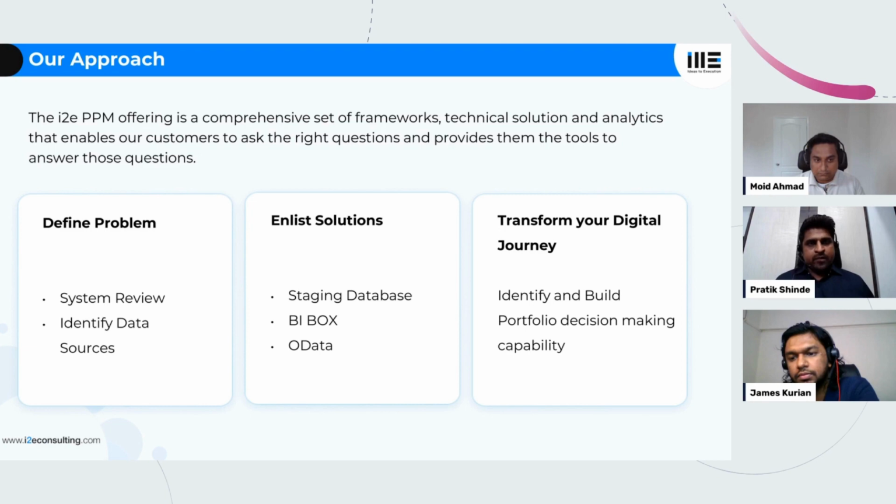We also look into the pain points of the customer, what expectations they have when it comes to reporting, what key KPIs they look for when they want to see the dashboard, and basically what decisions they want to make looking at the dashboards. That is a very important parameter to understand before reporting. Then we also identify the different data sources where the data is coming from. Is the data only from Planisware, or is it coming from third-party applications, like an HR system, a finance system, or a separate time card system? We identify the different data sources.